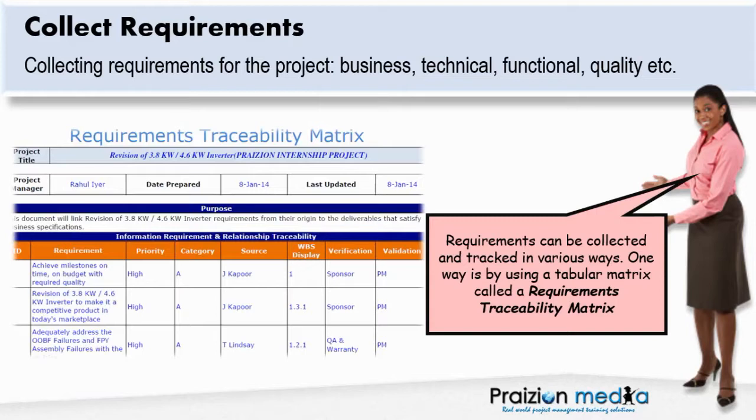This is a rather important document talked about in this aspect of project management within the PMBOK guide. Various types of requirements traceability matrices could exist. Typically, this document is used to track requirements to their origin. And in addition to that, some variants of this could exist. You could have a requirements traceability matrix that tracks requirements to their origin and business case, or requirements to their origin and test script, or requirements to their origin and use case. It really depends on the requirements traceability matrix.